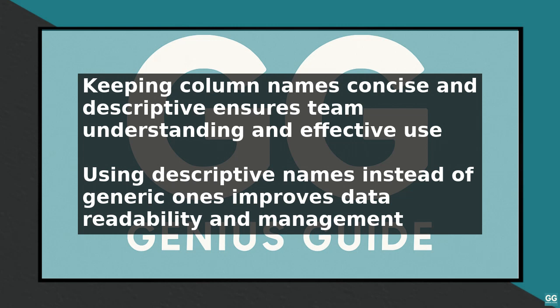Another best practice is to use column formatting to make your data more readable. Monday.com offers various formatting options, such as conditional formatting, which allows you to highlight specific data based on conditions. For instance, you can use conditional formatting to highlight overdue tasks or high-priority projects.